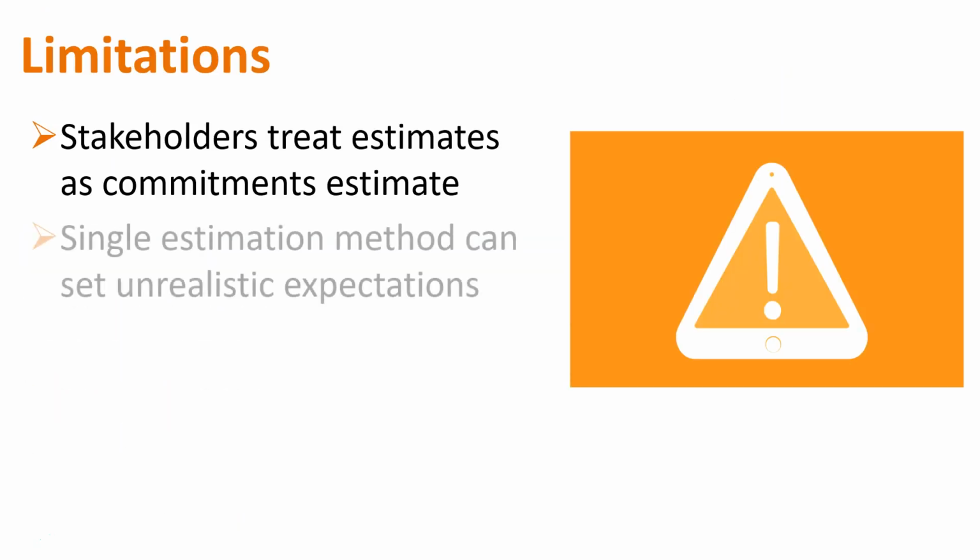The limitations of this technique is that, and the reason I was saying a range, like that cone of uncertainty, is that if I say to you, pretend that you're one of your stakeholders, particularly higher up, I say to you, I think it'll take, I don't know, maybe 6 months. What do you hear? Exactly. You don't hear my words, maybe, about, you don't hear any of that. You hear 6 months, right? Because that's how stakeholders work.